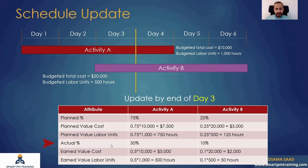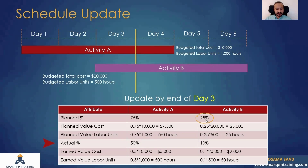The actual progress: Activity A is 50% complete and Activity B is 10% only. So Activity A should have been 75% by end of day three, but actually completed 50%. Activity B is also in delay — planned 25%, actual 10%. You calculate the earned value cost and earned value labor units by multiplying the activity percentage complete by the total cost or labor units for each activity.